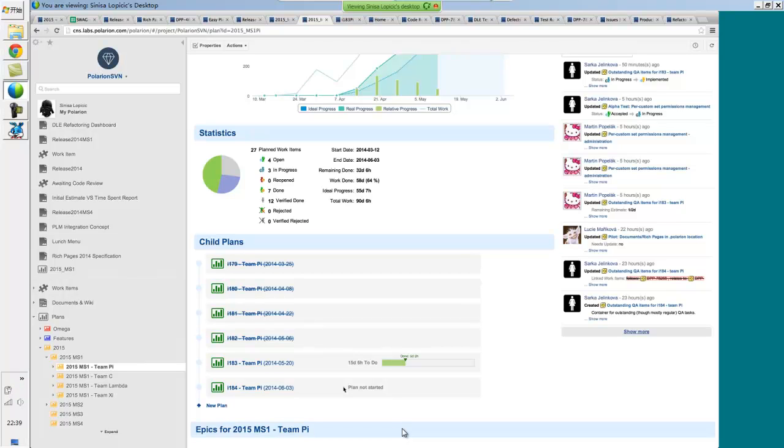The start date is the obvious one, so we started a bit after the GA. The feature freeze date in this case is 183, so it's usually 2 sprints before the release, and it is the date when we stop developing any feature work that goes into the release. The reason is that we want to keep around 1 sprint for any feedback or adjustments needed to a feature, or for QA to catch up on it and ensure good quality around it.